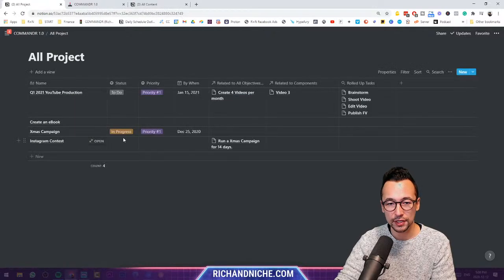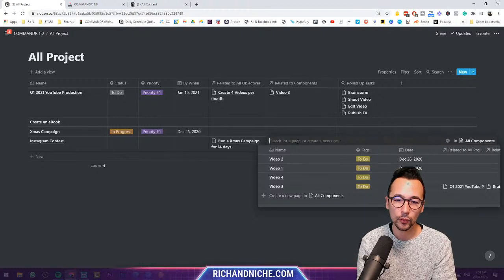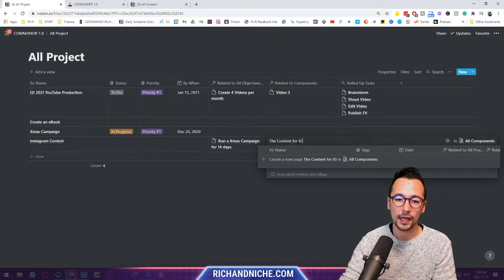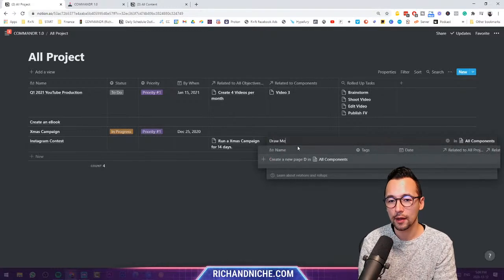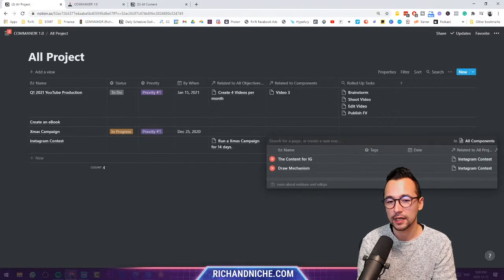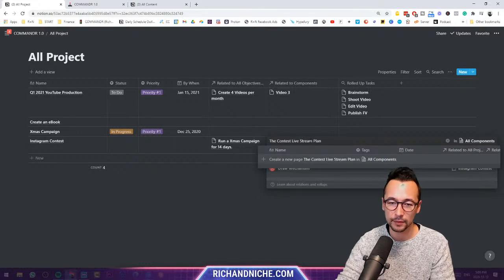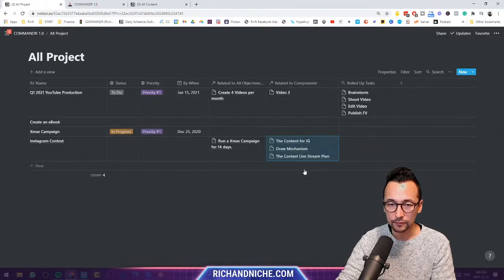So now that I'm in projects and I have this Instagram contest, what are the components to that? Well, perhaps it's the content. And perhaps it's the draw mechanism. You have to figure out how you are going to draw the person for the contest. And then you're going to have the contest plan, live stream plan. This is something like what I did recently. So all these components are bigger than tasks, right? I can't just do one task, content for IG.